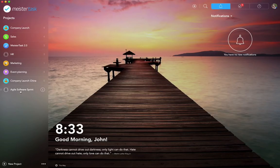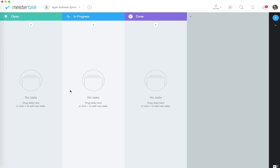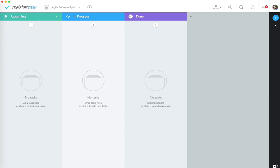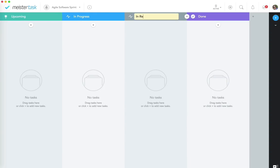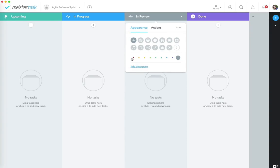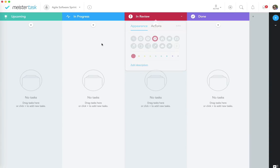Clicking on the new project opens it — currently empty with no tasks. We want to use the different sections to set up an agile project. By default MeisterTask provides 'Open,' 'In Progress,' and 'Done' sections — the basic Kanban principle. We can rename them: changing 'Open' to 'Upcoming' and adding an 'In Review' lane with a different color so we can identify it at a glance.